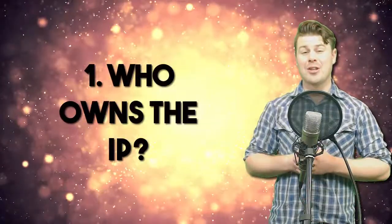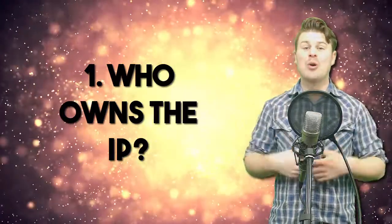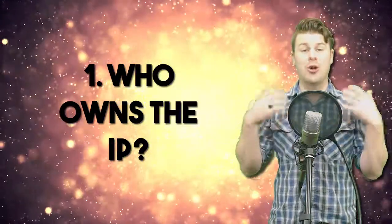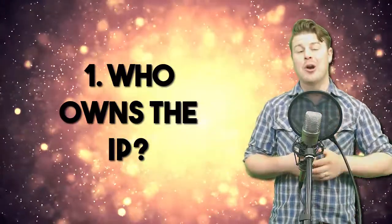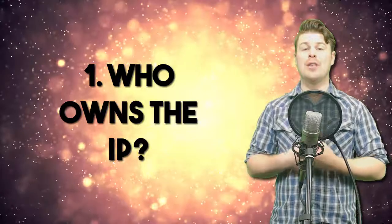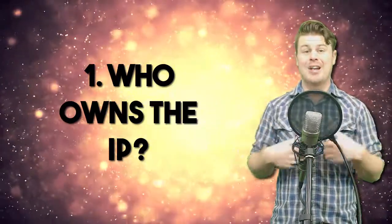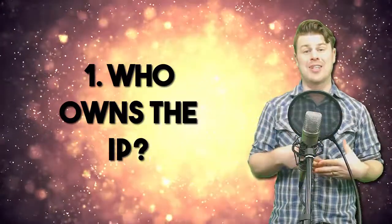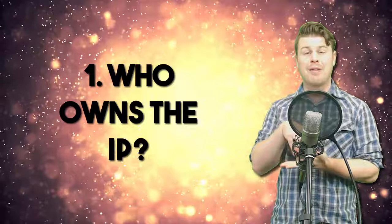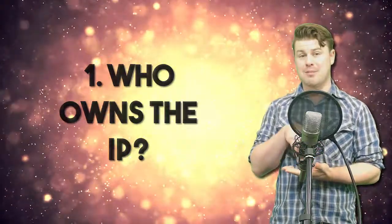Number 1, the first thing that you need to know about a project is who owns the IP at the end of the day. Who owns the intellectual property? Who actually owns the site? You'll be amazed. There's some digital agencies out there who will actually take ownership over the IP at the end of the day. So you're simply paying them to build the site and host the site potentially, but at the end of the day, it's their property, not yours. So make sure in the agreement right from the start, it's clear that you own the website after it's built.